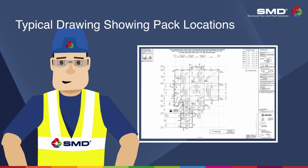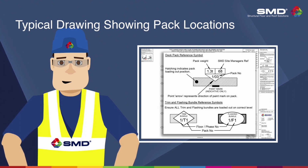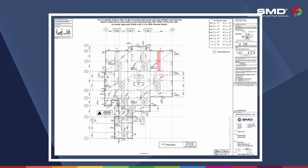To minimize the risks of manual handling of materials and unnecessary working at height, it is important that the position and orientation of the packs are in line with SMD drawings to allow for safe installation of the materials. When packs are not positioned in line with SMD drawings, the client will need to reposition the materials accordingly.